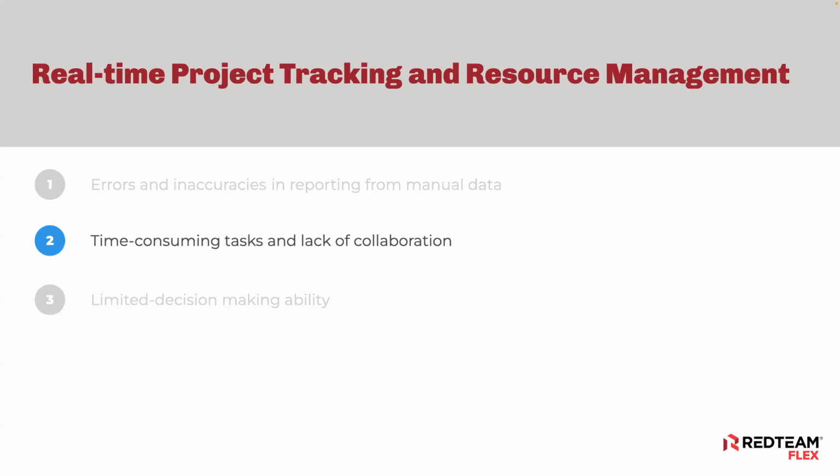That was a result of 12 bulletins, unforeseen existing conditions in an older building, an additional interior designer brought in mid-project, and all the other bumps in the road that we tackle and go through during a construction project.